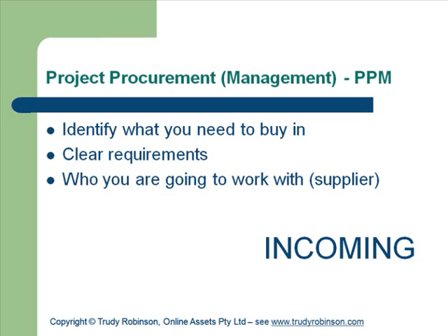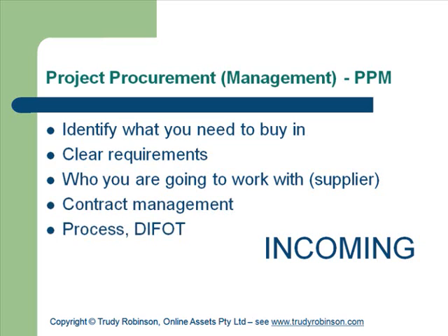Then you go through an evaluation exercise and you say, okay, who is it that we're going to actually work with as the supplier, and go through a contract management exercise and the process of how you manage the contracts throughout the life cycle. You'll know what DIFOT means, delivery in full on time. Normally when we're looking at your contract management, you have to have some method of managing your DIFOT to make sure that it's worthy to pay them when they're actually demanding to be paid. And of course then we have payments.